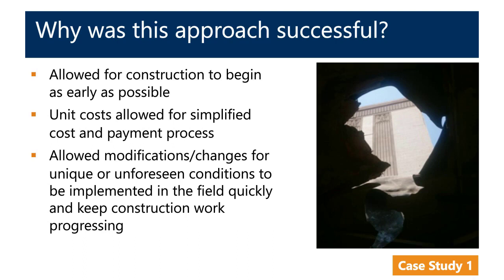It also allowed for quick modifications, any changes for unforeseen conditions, because we were always involved with the contractor on doing a bunch of drops from the initial to openings to final installation. Any modifications that needed to be done were picked up quickly. Details could be made if need be, supplemental details sent over to the contractor so that it didn't stop them from work on any one drop, able to complete the work and move on to the next.